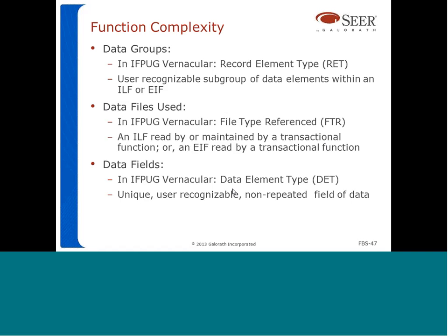And finally, data fields, in the IFPUG vernacular, we call them data element types or DETs. Basically, a data field is a unique, user recognizable, non-repeated field of data.